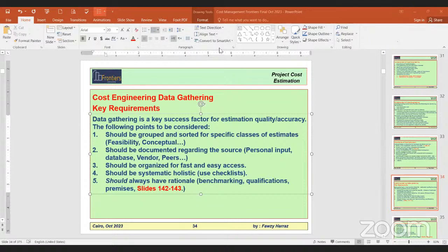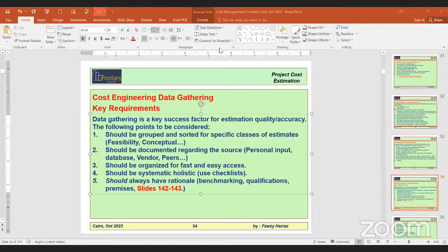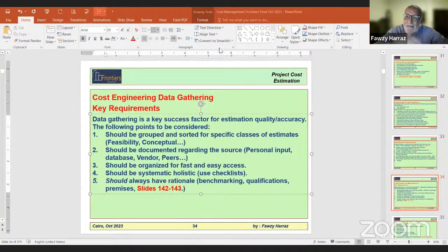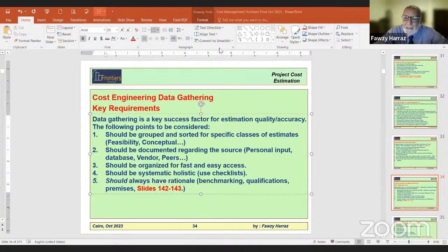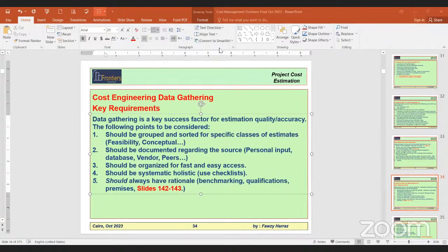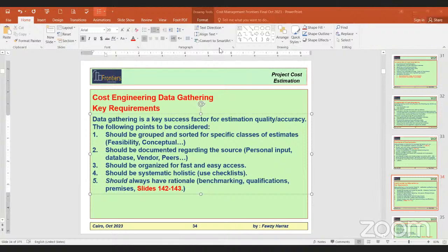Yes, there are political games always in these high-level projects. Maybe there is an unwritten agreement that the owner will give variation orders, 40% of the project, as variation orders with reasonable cost amounts. So there is some collusion. The contractor does not accept a losing bid. He definitely has a plan how to make this low bid a profitable job for him.